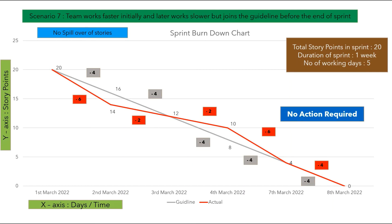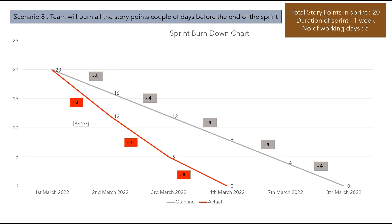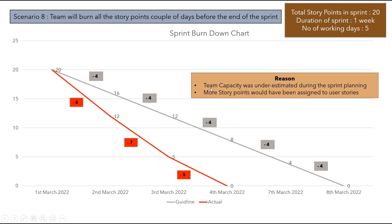In another scenario, the team completes all 20 story points two days before the end of the sprint. Day 1: 8 points; day 2: 7 points; day 3: 5 points — remaining story points reach 0 by day 3. Since the team cannot sit idle, they may take extra user stories from the backlog, but this is not the right approach. The reason could be that team capacity was underestimated during sprint planning, or too many story points were assigned. Action is required to resolve this in upcoming sprints.